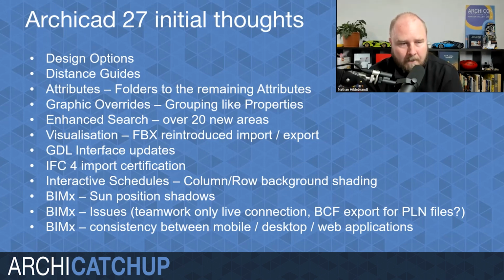So I'm hoping that becomes an option for people using solo files, because we all know that when you're working with residential clients, how good would it be if they're communicating in BIMx and then shooting off a BCF file to you, so you can respond to that. At the moment, I use Airtable for my client requests or changes instead of emails. They go onto my Notion page, populate an Airtable form, and then it populates a database of client issues, and then we track each issue off as we resolve it.